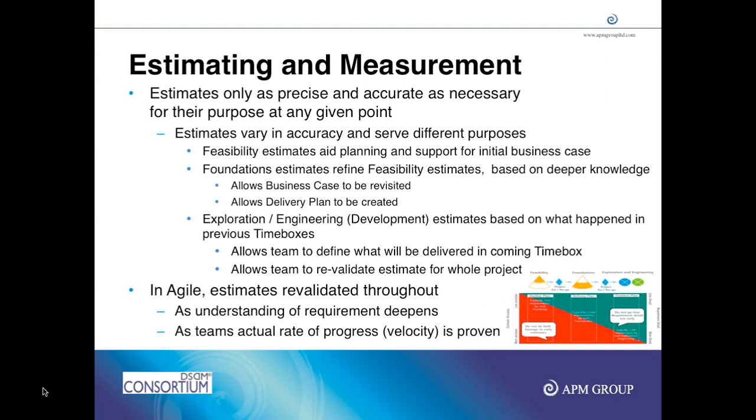So everyone opens it. Now let's say I've got four people in my team. Somebody may have rated it as 3, somebody as 5, somebody as 8, but somebody may have rated it as 21. 21 is not the number of hours or days, but it just tells how complex or large we think this story is. Now, if there is too much difference between team members, then obviously, even before we start working, we know the team has some difference in understanding. So we clarify and we make sure that there is no large variation in these numbers.